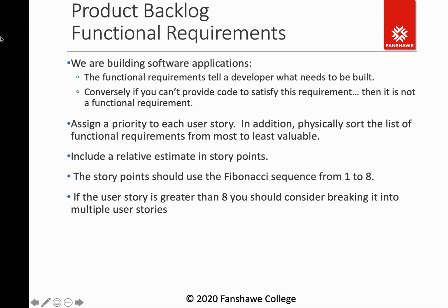And that's a problem. If somebody wants a new car, do you want basic transportation for four, or do you want a luxury vehicle? The cost can be pretty wide depending on whether you want basic transportation or a high-end automobile. So again, by defining the requirements and then estimating each one of them, you're going to be able to generate what you believe to be the total estimate, the cost of building a system.